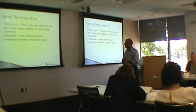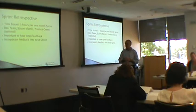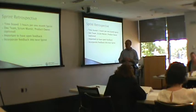The retrospective is three hours for a one-month sprint, so a two-week sprint would be about an hour and a half. The guide says the product owner is optional, but I always recommend the product owner attend the retrospective. It's all about open feedback, and it's important to incorporate that feedback into the next sprint.